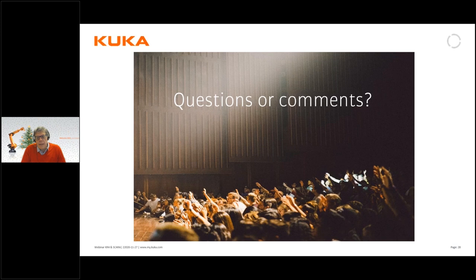By using this type of digital twin with KUKA.Sim, we want to change the FAT and SAT or commissioning from problem correction to basically just doing a functional verification or demonstration to the customer, because we have already taken care of almost all the problems in the simulation already. That will dramatically decrease the total time spent on error fixing and dramatically decrease the need for resources on site for commissioning. With this model we believe we have an opportunity to dramatically improve the quality of our projects and increase our profit margin.